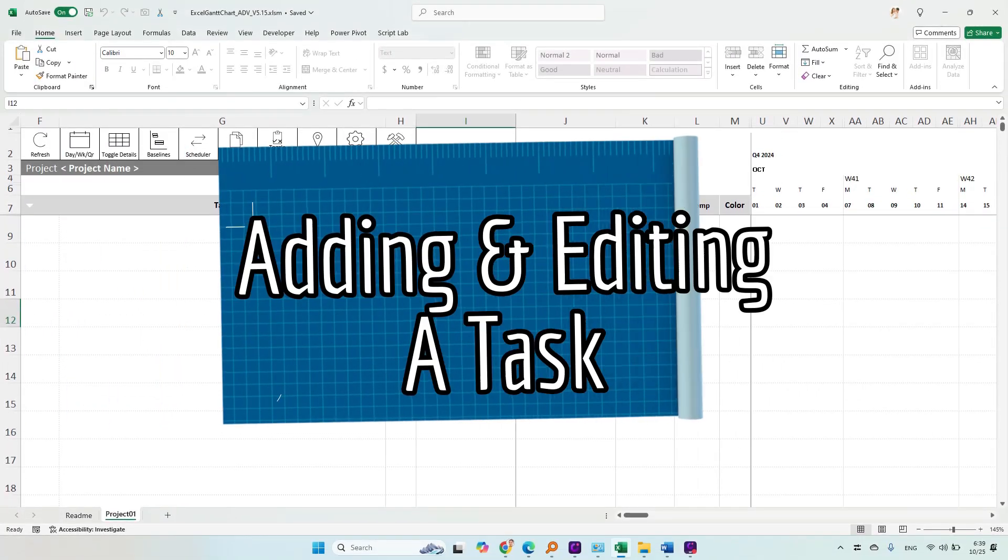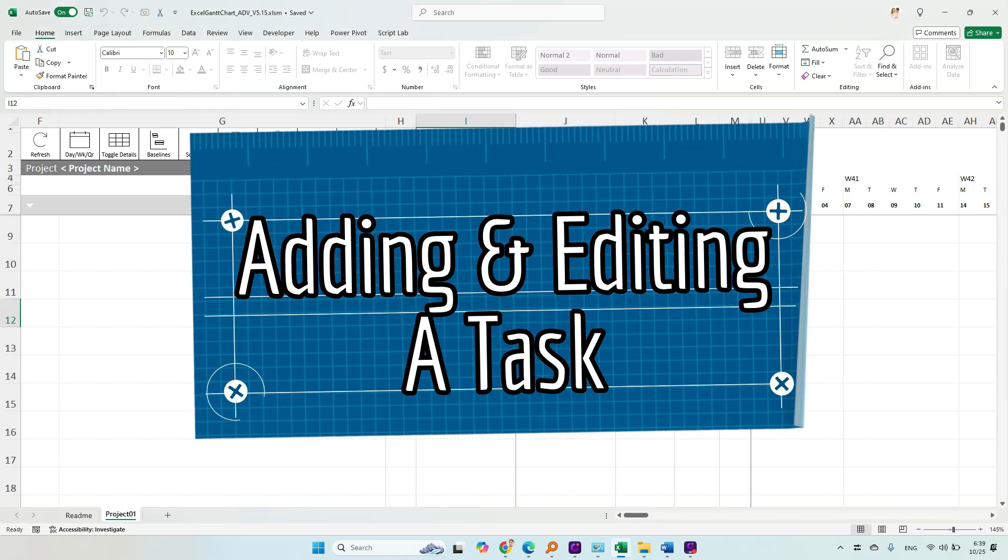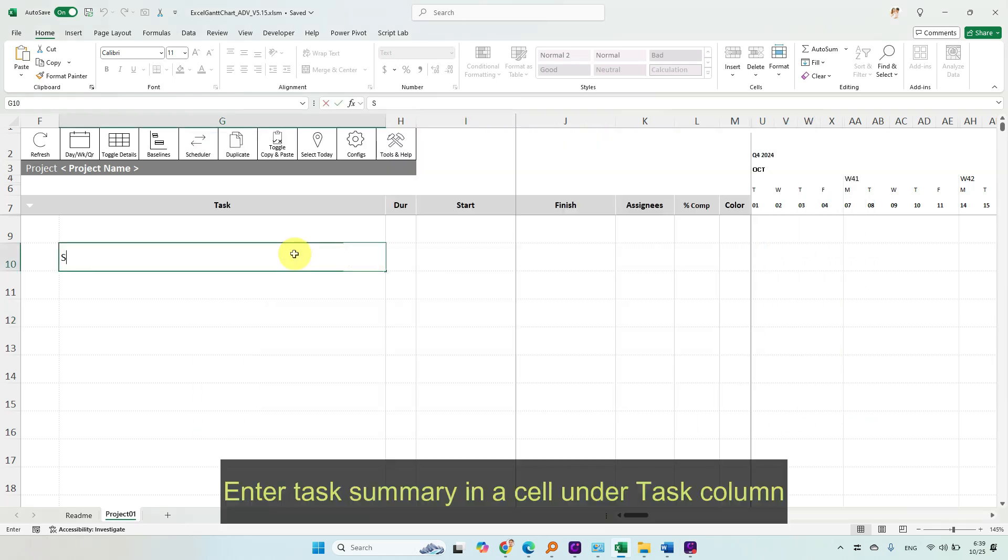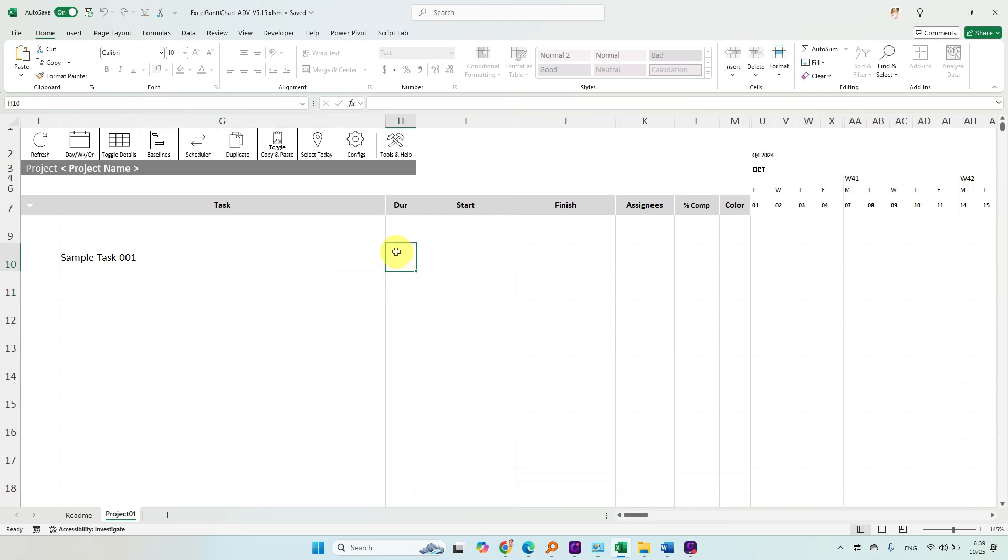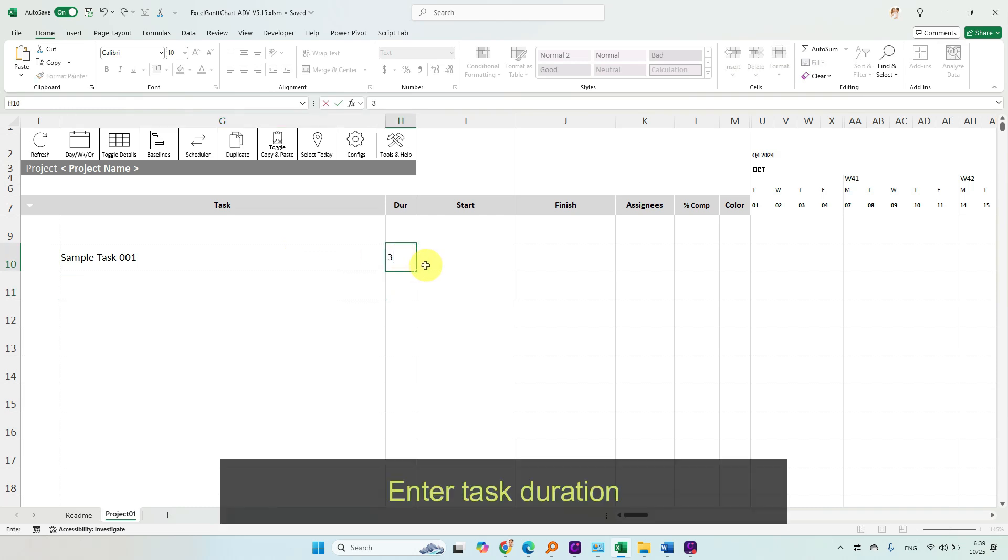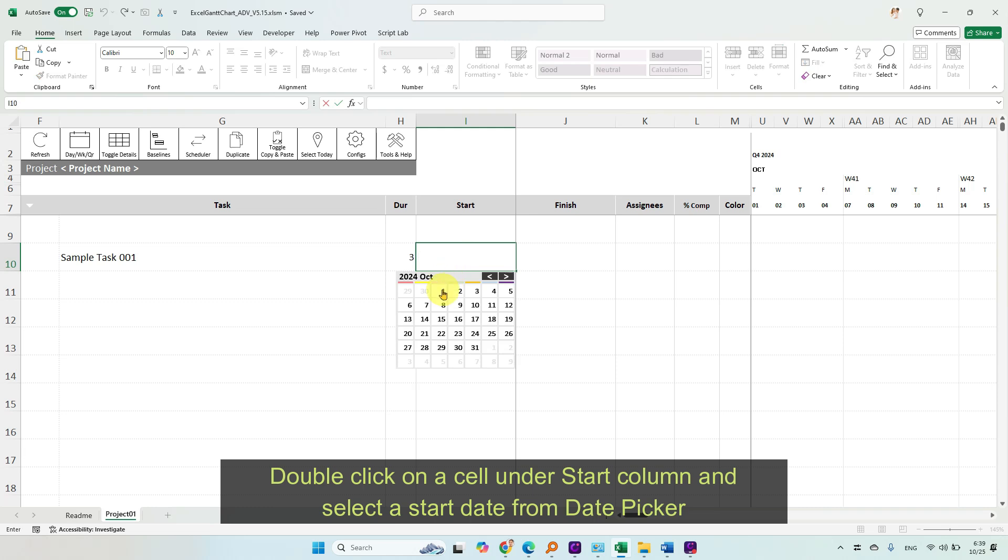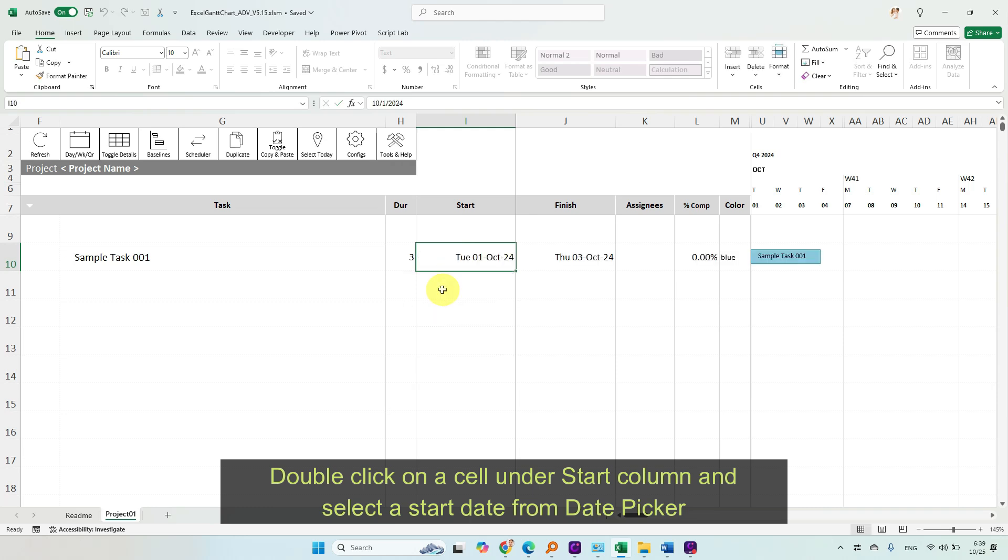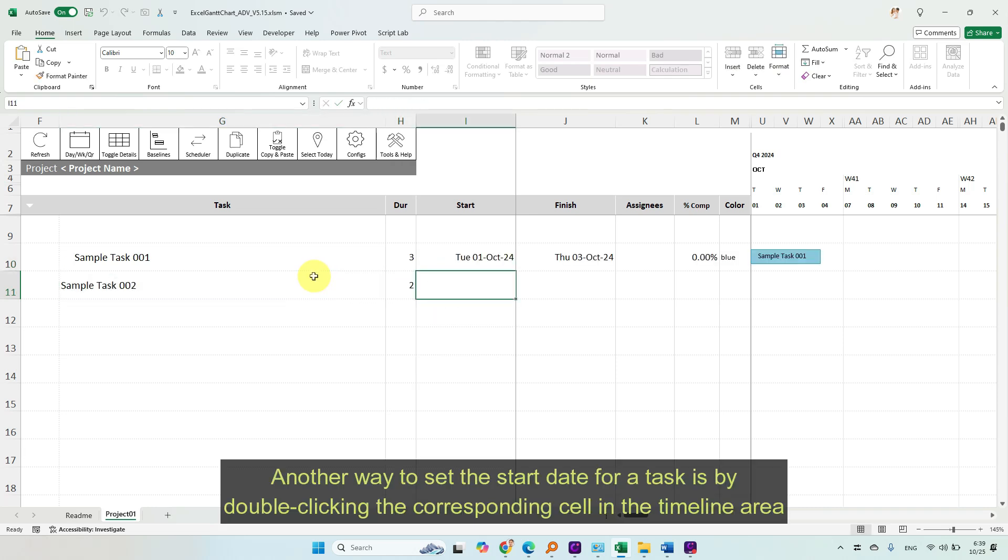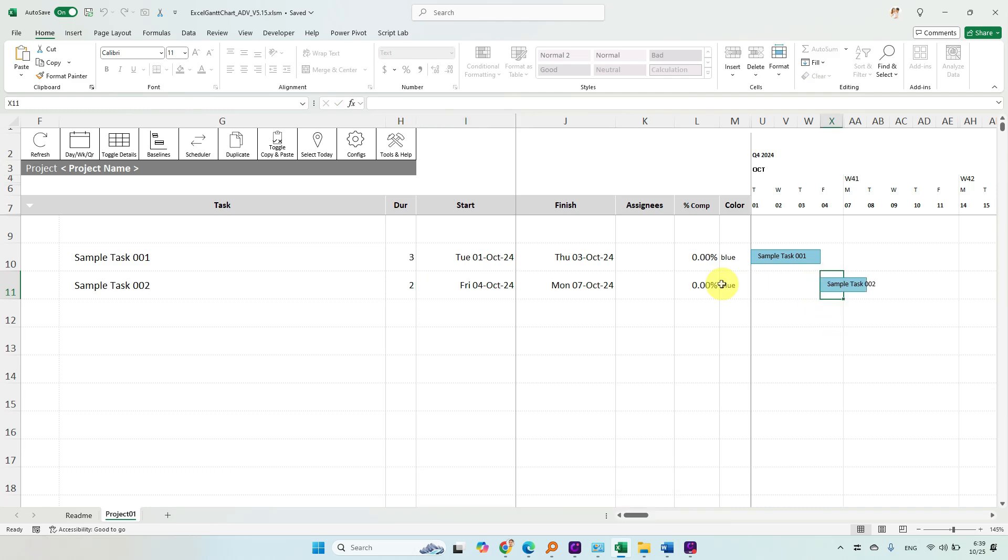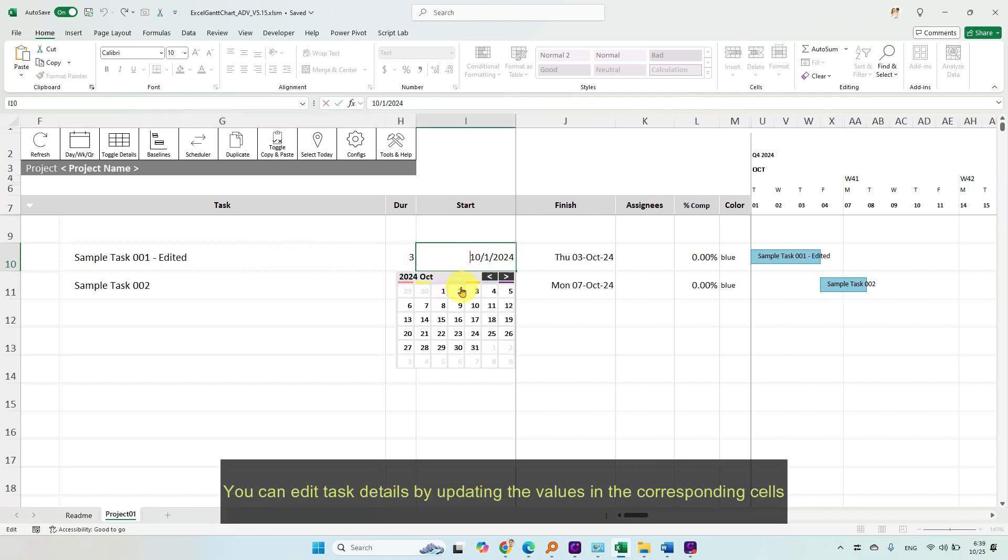Adding and editing a task. Enter Task Summary in a cell under Task column. Enter Task Duration. Double-click on a cell under Start column and select a Start Date from Date Picker. Another way to set the start date for a task is by double-clicking the corresponding cell in the timeline area. You can edit task details by updating the values in the corresponding cells.